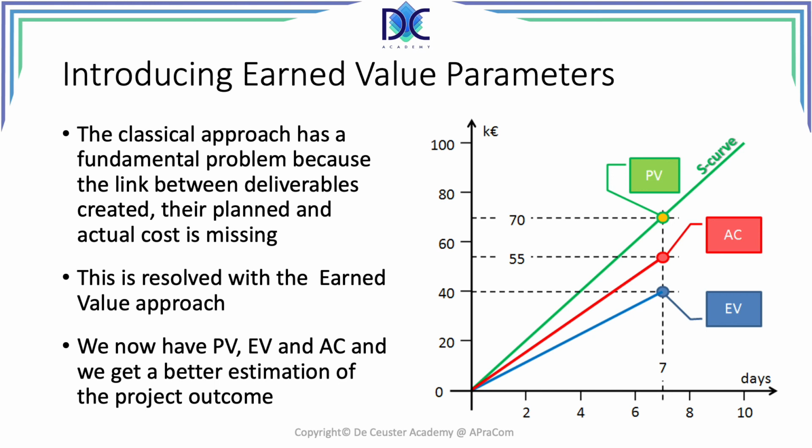And this also means that we have to be careful what's happening when we are measuring, because we now have a way to determine how much do I expect the project to cost at completion. And I can compare that with the financial parameters and say, hey, am I still within the constraints, the conditions of the business case? Yes or no? And when I find out that I am within those conditions, I can continue. When I'm outside of these conditions, I can find out what to improve and if it's still possible to find a solution to complete the project with a profit.